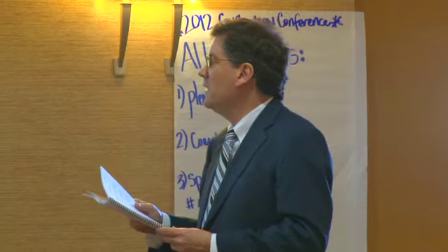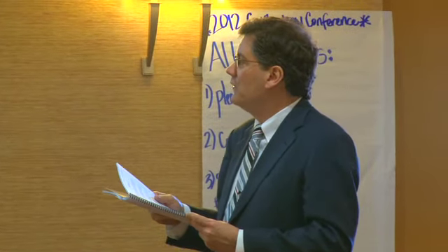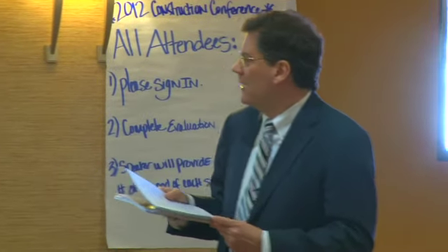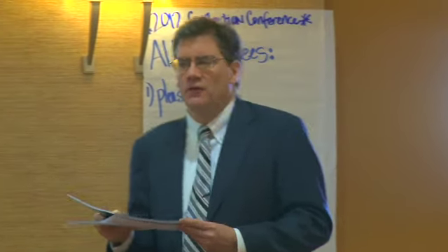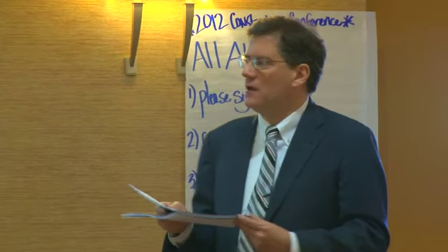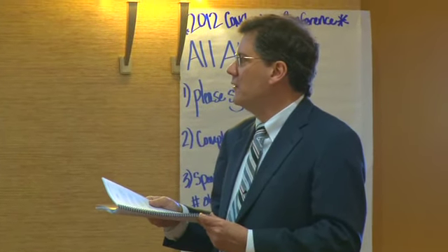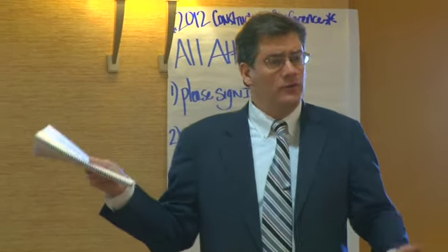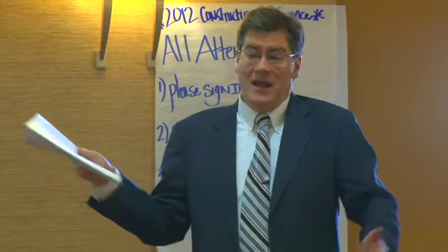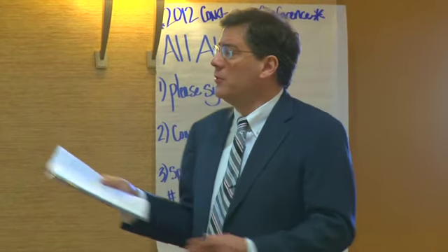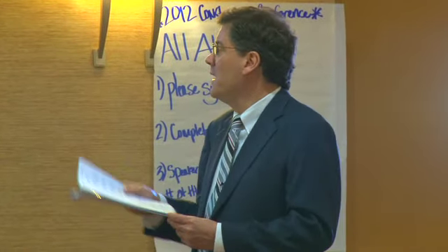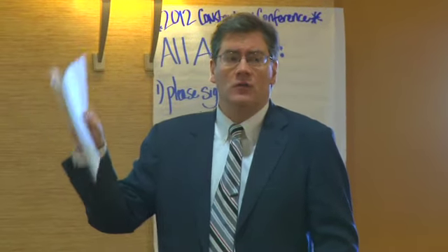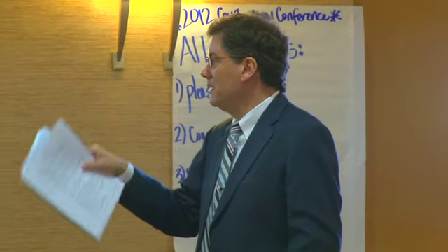Are they effective against lenders? Stop notices are not effective against construction lenders unless they are bonded. You've got to have a bond attached to it. Now, a lot of companies don't want to go out and pay the premium, get a bond to serve it with the stop notice. So they don't even try to serve this against the lender. You can serve a stop notice against the lender without a bond, and they might abide by it. They probably won't. They'll recognize that there's no bond. Lenders can ignore those non-bonded stop notices. The stop notice against the owner does not have to be bonded.